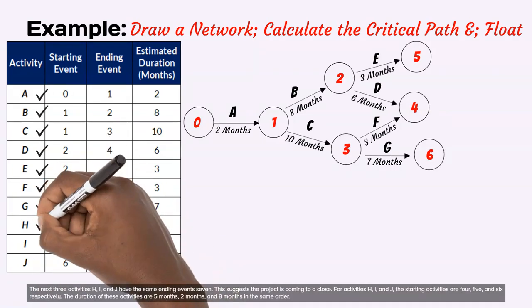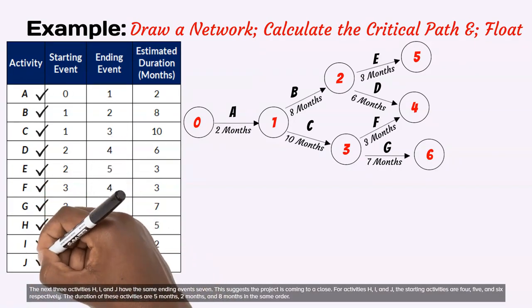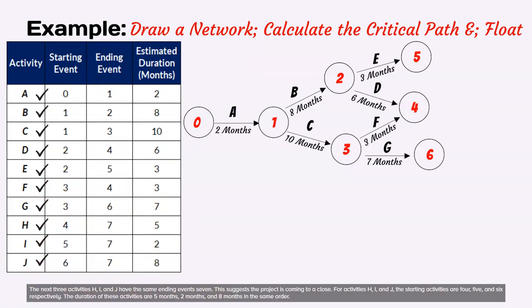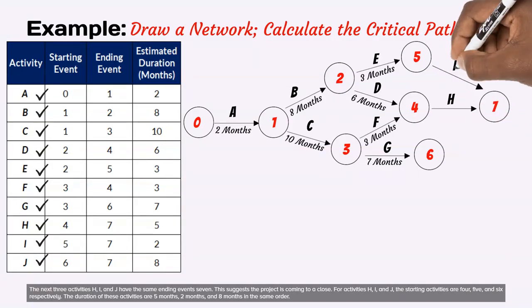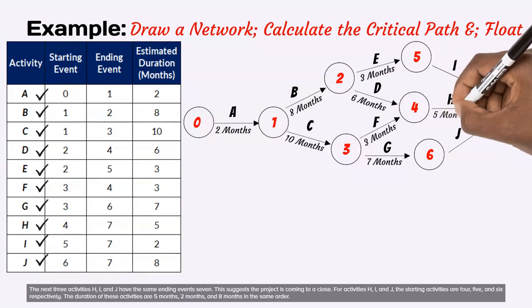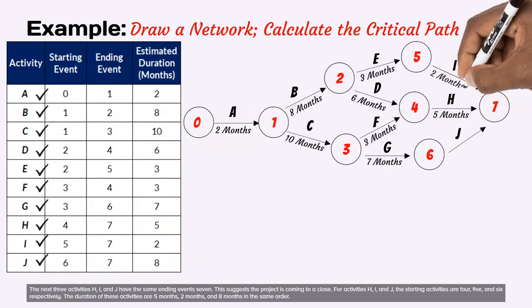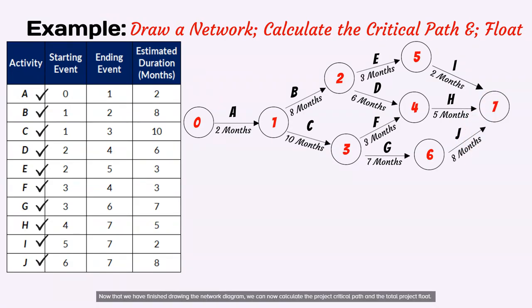The next 3 activities H, I, and J have the same ending event which is 7. This suggests the project is coming to a close. For activities H, I, and J, their starting activities are 4, 5, and 6 respectively. The duration of these activities are 5 months, 2 months, and 8 months in the same order. Now that we have finished drawing the network diagram, we can now calculate the project critical path and the total project float.